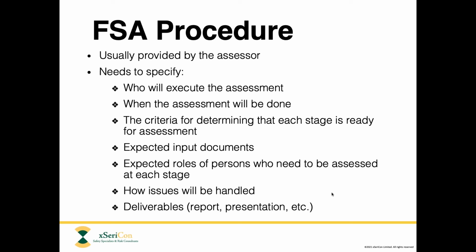The third one is almost the same as what I just said. What are the criteria for determining that we are ready to go ahead to execute the assessment? Usually we will provide a list of expected documents from each stage, and we would normally say, if you have got all of these documents ready and approved, then we're good to go. But if most of the documents are not ready, then we suggest that you wait until they are ready.